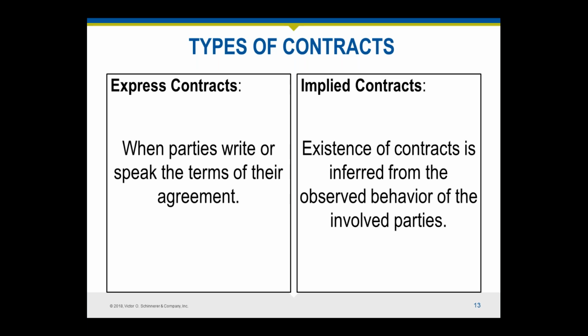In another situation, let's say the client never signed your professional service agreement, but you began working on the project. You sent an invoice to the client, which the client paid. Then did the design professional, or did you, have a valid contract with the client? Yes, I believe the law would infer acceptance of the agreement because of the client's payment.